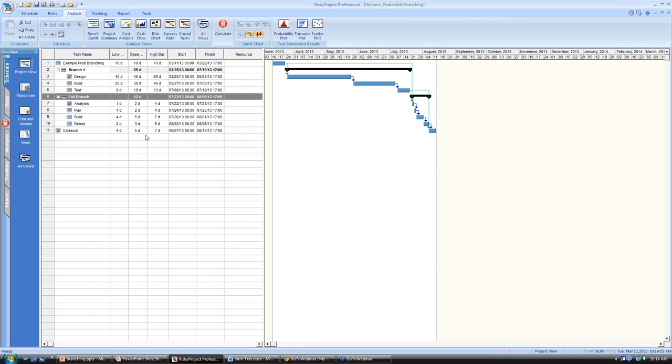We've put uncertainties in, and if you're more familiar with RiskyProject, we could also assign risks to the mini schedule on the fail branch that take into account risks associated with these new activities. So we get a much more realistic and concrete understanding of how the fail branch is going to affect our project schedule.